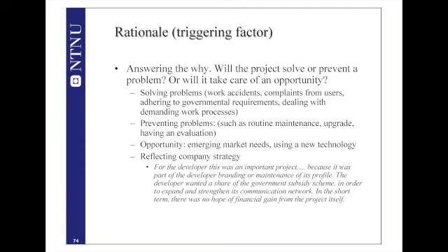Or maybe there are new government requirements, new changes. The government changes the requirements of certain procedures. You need to adhere to that. Or at least if you have a demanding work process where you use a lot of effort, you use lots of resources to execute these work processes, then you need a project to address that.